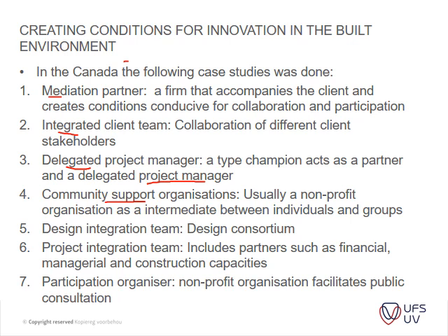Then you get a design integration team. That's a consortium that is now a whole design team. That's the professional team. Then you have the project integration team, which includes partners such as financial managers and construction capacities. This is a little bit more removed, more like a developer advising the client.